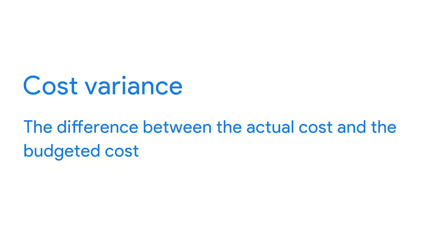Another quality metric is cost variance. It illustrates the difference between the actual cost and the budgeted cost. Simply put, cost variance compares what you plan to spend versus what you actually spent. Let's put it in an example. If you budgeted to only host 250 attendees at an upcoming business conference, but 275 people showed up, and the venue charges you for those additional guests, the actual cost will be higher than your initial budget or estimate. So to recap, quality metrics can include things like number of changes, issues, and cost variance.